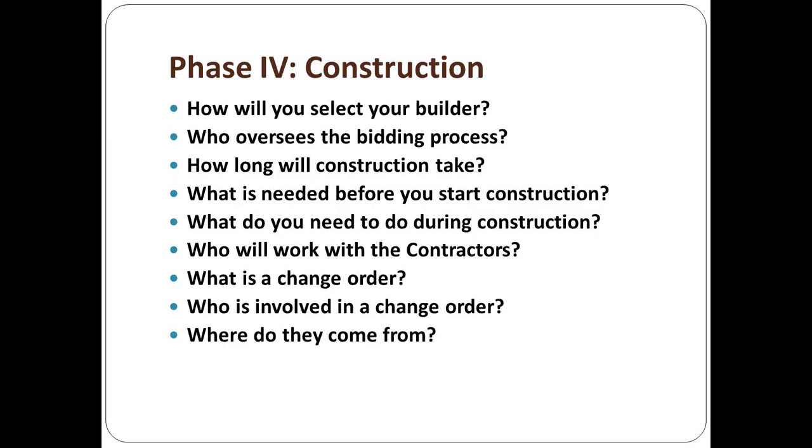What's involved is seeing the need for making a change order that may save you money, cost you money, may save you time or cost you time. And that is going to move a door, move a window, change some mistake in the plans. The plans are incomplete or incorrect, or there's a conflict between the plumbing and the electrical, or the ductwork and the HVAC. And so they've got to set up a detailed document, have the architect approve it. The builder probably generates it as he builds the building, and have your signature, the architect's signature, and probably have to have the local building authorities approve it. And it may cost you 10 minutes or it could cost you 10 days or longer to make that change.